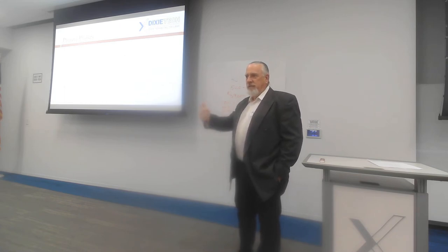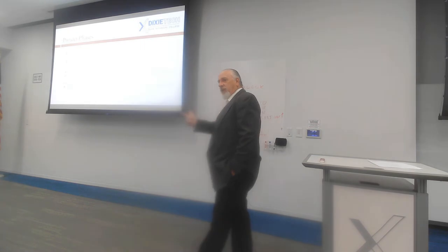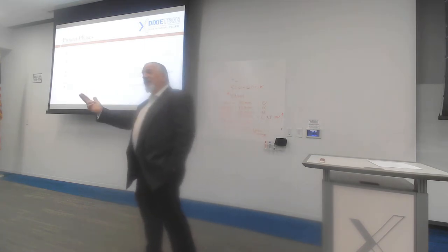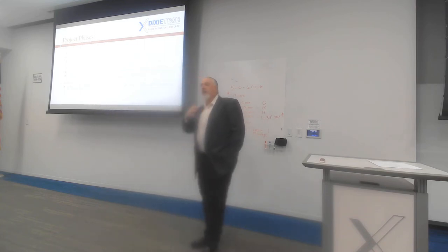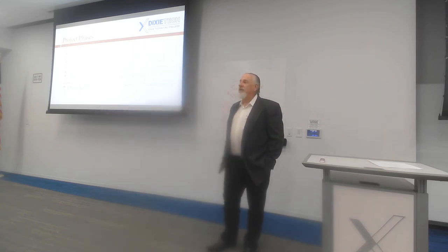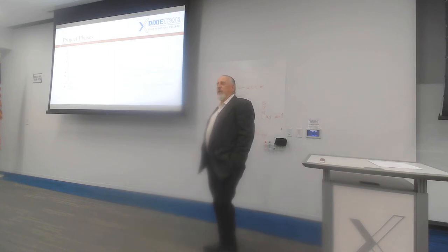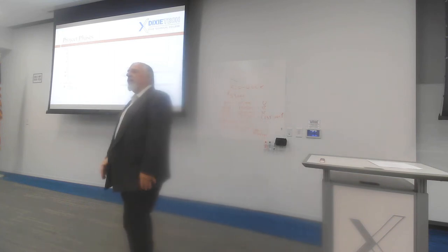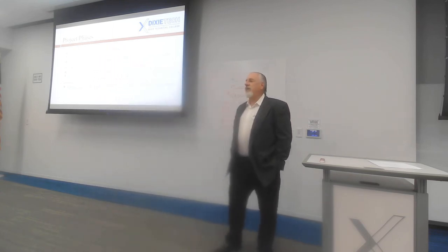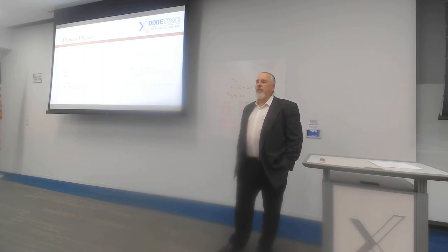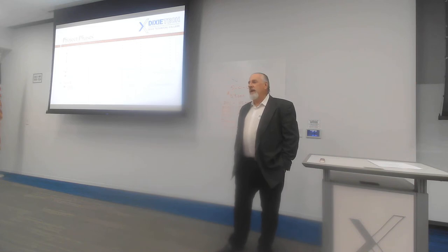All the money was there. All of the investor support was there. In the end, all of the parts to build it were there. We couldn't get an approval from, I had nothing to do with it. Couldn't get an approval from the county in the end. They had given preliminary approvals, and then there were two elections that dragged out so long. There were two elections, 2 years apart, that both brought different contention into the project. So the project looked like it was going to go. It had verbal approval from people that needed to support it politically, and in the end, it didn't happen.